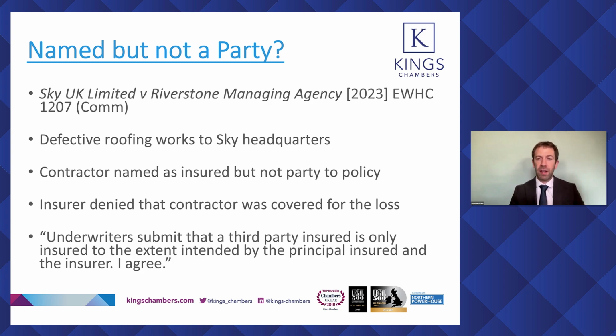The consequence in this case was that Mace, as contractor, had the benefit of the insurance down to practical completion, but not afterwards. That was because once it handed back the building to the employer, it no longer had any interest in the insurance policy on the basis of the construction contract. So yes, that's Skye and Mace.